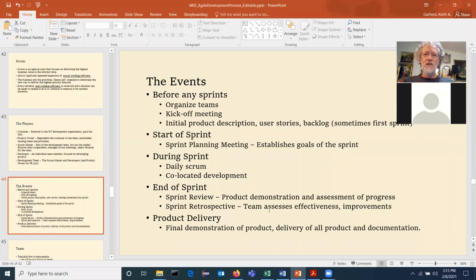You assign effort to each of the tasks. Now up front, you try to assign effort to each user story. By that, I mean, okay, here's a user story. How long is that going to take? That's 8 hours of work. Okay, we broke it up into 3 tasks: 2 hours, 2 hours, and 4 hours. And then people volunteer to take these on.